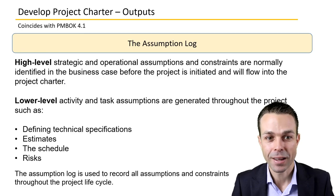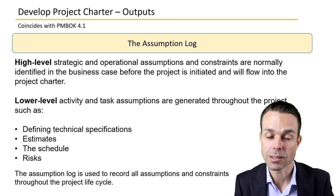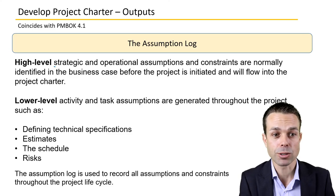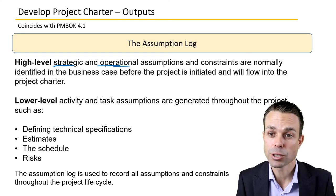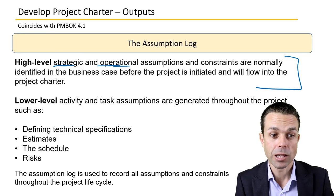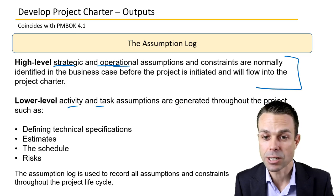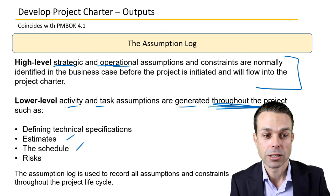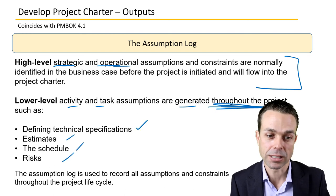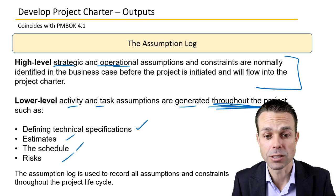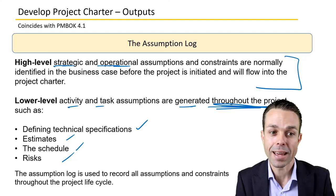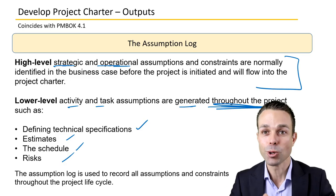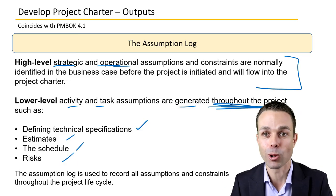Lastly, the assumption log. We make assumptions when doing this high-level document, and we just need to record what assumptions have been made. High-level strategic and operational assumptions will have been made and put into the document. Lower-level activity and task assumptions are usually generated throughout the project as we go along, and those will include estimates, schedule, risks, and technical specifications. The assumption log is used to record all assumptions and constraints throughout the project lifecycle, and it starts at a high level when we're developing the project charter. And those are the inputs, tools and techniques, and outputs — a general overview of developing the project charter.